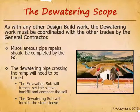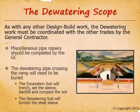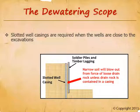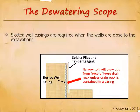Excavation subcontractors don't usually have a bunch of steel pipe lying around the site, so we want the dewatering sub to furnish their own steel sleeve. If we don't tell them to provide the steel sleeve, they won't — and when it comes time to run that pipe across the trucking ramp, someone's going to have to spend a couple hours in a fire drill running down to the hardware store. Slotted well casings are required when the wells are too close to the excavation, which is very common on inner city projects. The slots allow groundwater to run freely through the casing. With uncased wells, we run the risk of cave-in — depending on how far back the wells are from the excavation, a cave-in may not occur until the excavation reaches 40 or 50 feet. That's a big cave-in, and a lot of drain rock that's just going to dump and run into the excavation. Dewatering subcontractors will not provide these casings unless specifically directed to — this is a very common exclusion and, when overlooked, results in a sizable change order request and a huge hit to the general contractor's contingency.